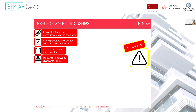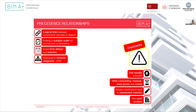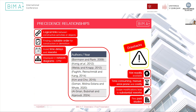What are the drawbacks of precedence relationships? First of all, they are not readily available on BIM-based or CAD-based models, but they highly depend on the planner's knowledge or experience. They can be quite time consuming. They are human-led, error-prone, and costly activity, and few scope modifications normally lead to substantial reworks. And despite their relevance, few past studies have been found in boosting or enhancing the precedence relationship analysis. Therefore, a gap was found in the current literature.